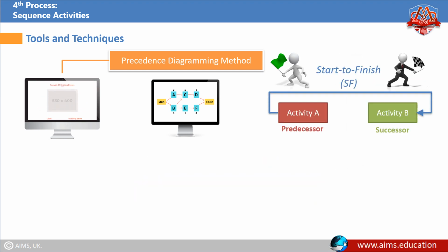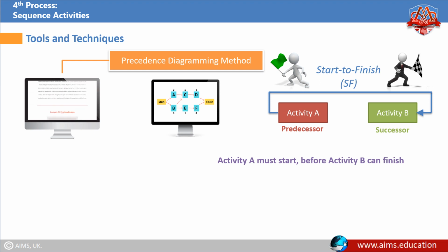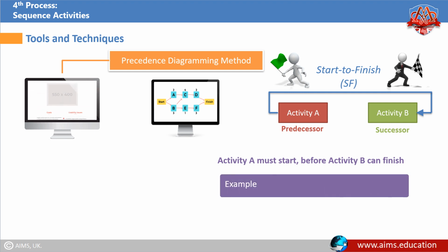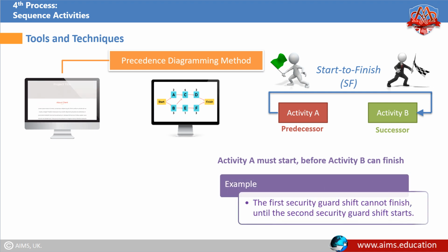Start to finish. Activity A must start before activity B can finish. The completion of the successor depends upon the initiation of the predecessor. For example, the first security shift cannot be finished until the second security shift is started.